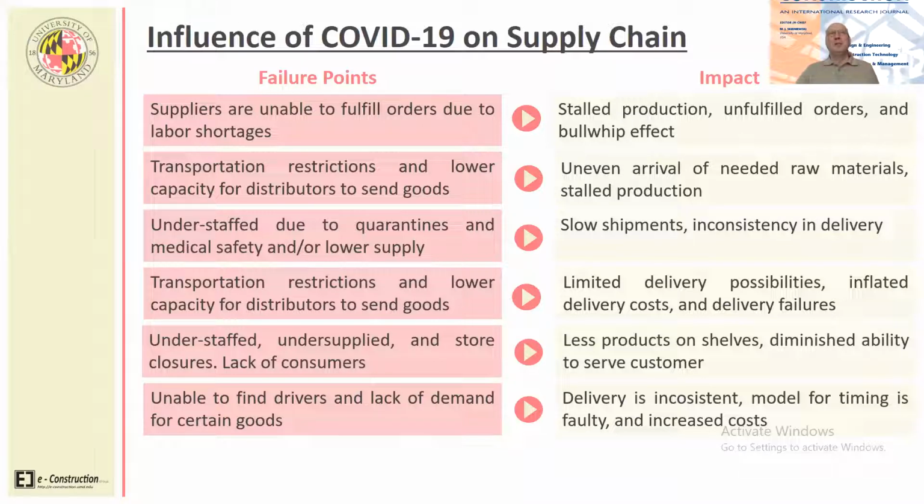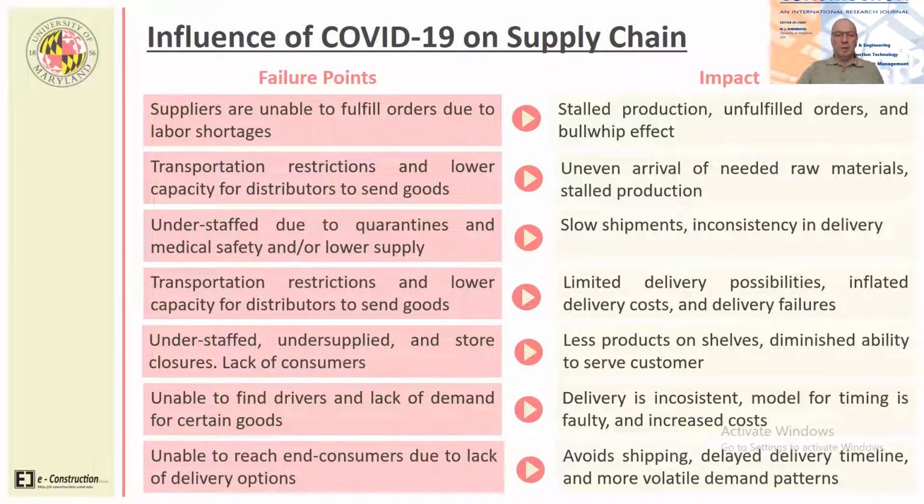Why? Because some of the so-called force majeure clauses in contract documents don't cover situations such as pandemics, only cover natural disasters. And there is a lot of litigation in US courts right now between companies that are trying to include COVID-19 as a pandemic, as a force majeure, and yet the opposite parties are arguing that force majeure was only intended for natural disasters. So that's the issue that we're grappling with.